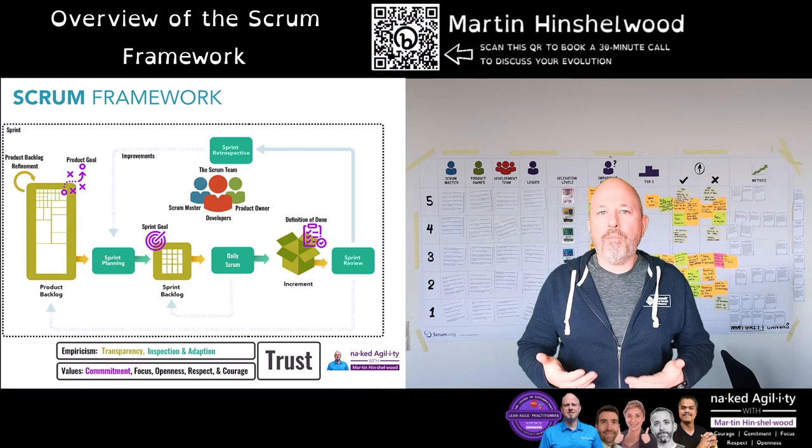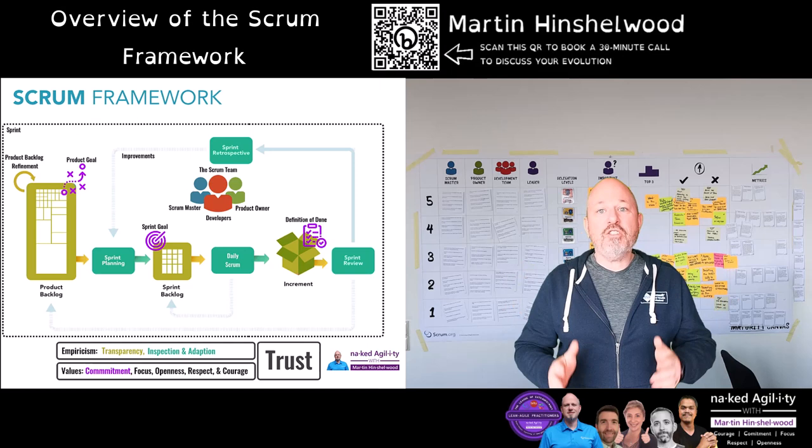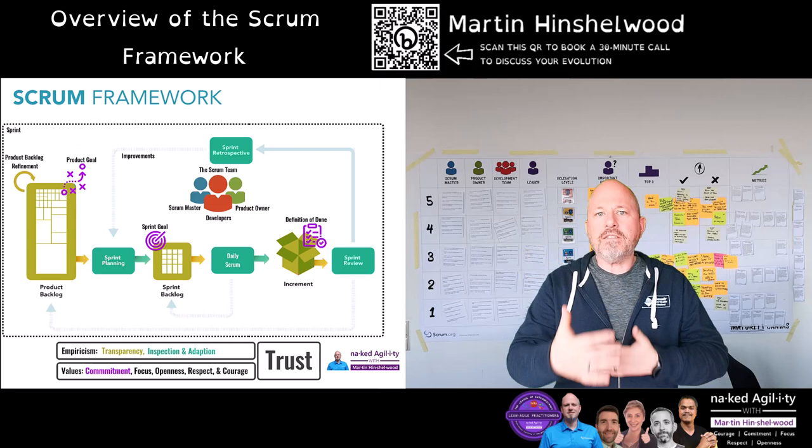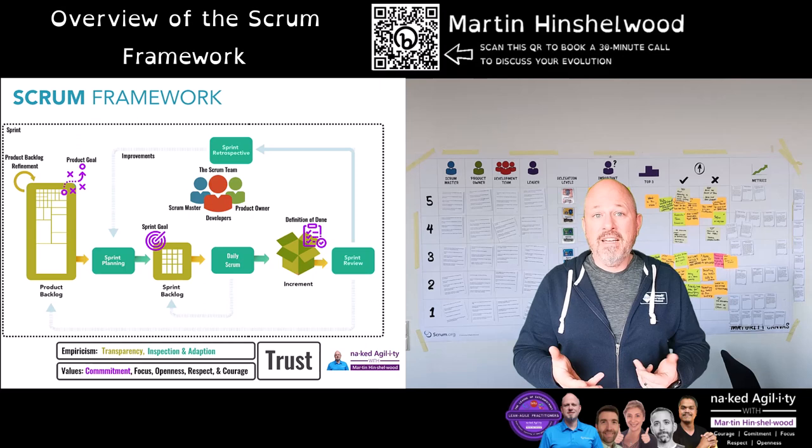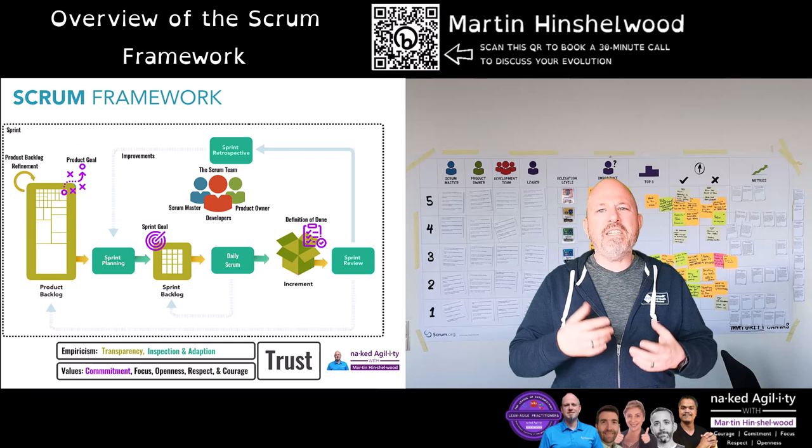Wrapping the entire Scrum process is the sprint itself. The sprint is a fixed-length iteration within which all the other activities are completed and represents the cadence of adaptation between the Scrum team and the stakeholders. While mentioned in the Scrum guide, product backlog refinement is not a specific event — it's a term that represents all of the work done by the Scrum team on items in the product backlog rather than those selected for the current sprint.